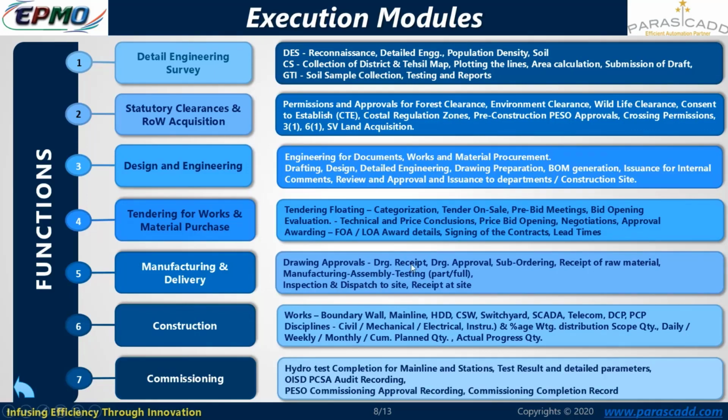And again, all these activities that I am reading, all the progress gets rolled up to get the actual projects done at the functional level. Functional level projects are rolled up to the project level, and with this we get the overall progress into the progress statistics and at the functional scheduling screen.